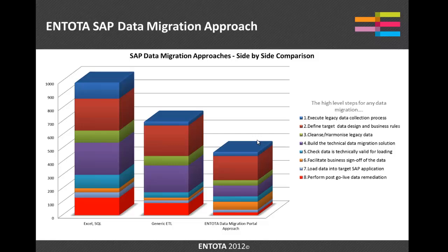What we're trying to do is bring a lot of that very much earlier on in the data migration and to automate that, so there is no need for you to have to build in technical validation checks for format, for mandatory fields, for the lookup values, etc. That's all handled automatically. And it allows you to focus on the business rules and the data design that is relevant to the business, rather than the technical validations. And by getting that right, what we find is that the remediation processes are much smaller, because the time has been spent with the business to identify those complex rules that are required to support the specific business processes that we're migrating around these objects, be that order to cash, be that procure to pay, etc.